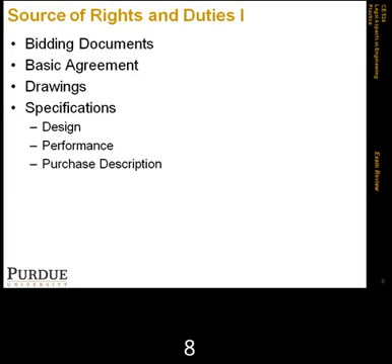Now, there is a relationship between specifications and labor union relations, and the reason is that many unions have created something called work preservation clauses with subcontractors. This basically tries to decrease off-site assembly and increase on-site assembly. They may actually refuse to install components that have been pre-assembled in a factory. This is looked upon by the National Labor Relations Board, NLRB, and they govern that.